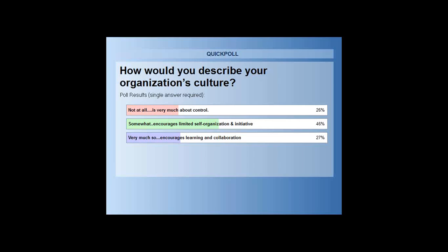For those of you that are thinking about going down this Agile road, or going further if you're already on the journey, you want to look into the different methodologies or frameworks, and you want to pick one that is suited to your culture. Scrum tends to be very much suited to a culture that's very much about collaboration, or at least is leaning towards collaboration. Kanban would be a great Agile framework if your organization is more about control. DSDM is also great, where there's more of that control, as well as RUP is also good for, I'd say, both control cultures as well as collaboration cultures. So based on your organization's culture, you want to find an Agile method that's going to work for you.